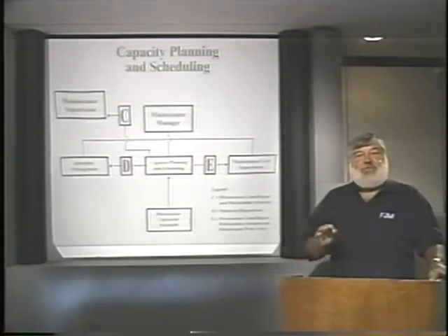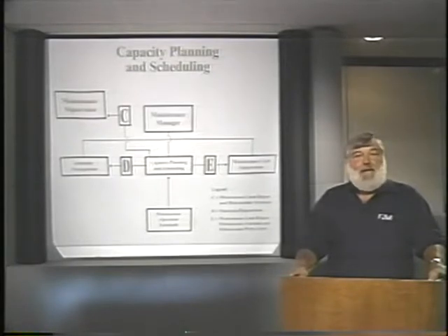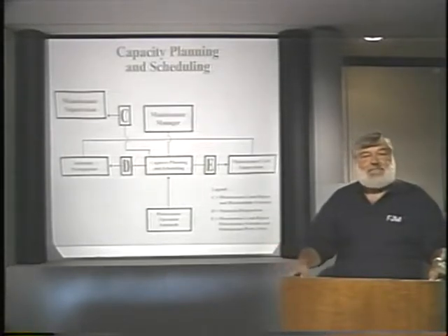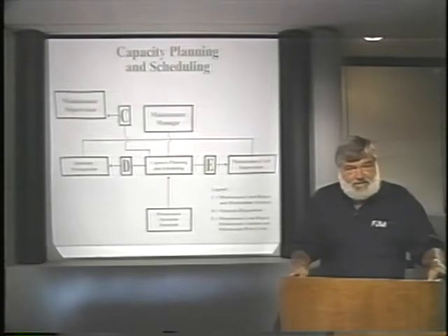It is the standards that you're going to develop relative to estimating how long it's going to take a craft person to perform a particular task. And you're going to find that one task may be applicable to other tasks for other assets.